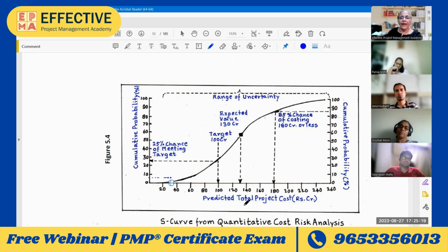On one hand, it is total project predicted project cost, that's the budget that they are trying to give me, and on the other hand it is probability. My confidence level is a probability. I'm telling them what do I think, how confident I am, what is the probability according to me that I will be able to close the project in that much budget. So they say, it's that bad, huh? What do you think? Can we give you 100 crores? Is that good? I say, if you give me 100 crores, I have about 25% confidence.